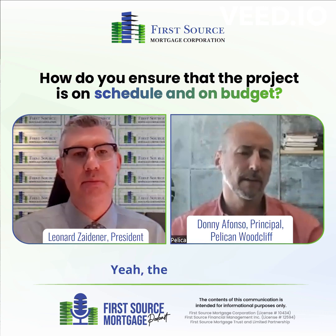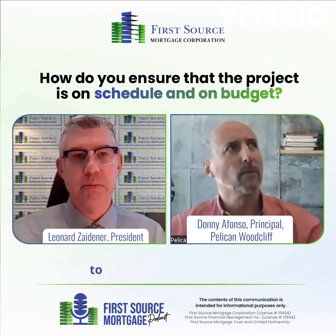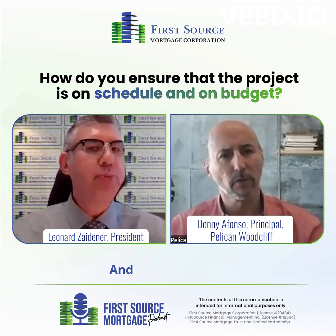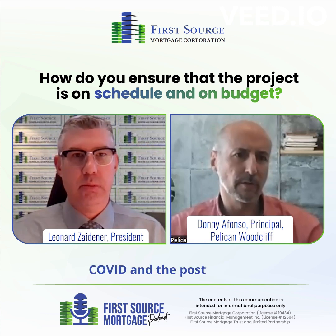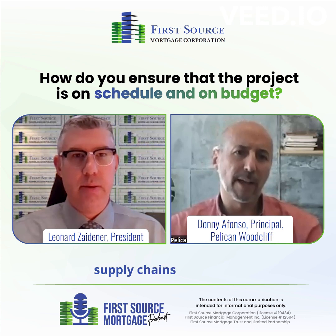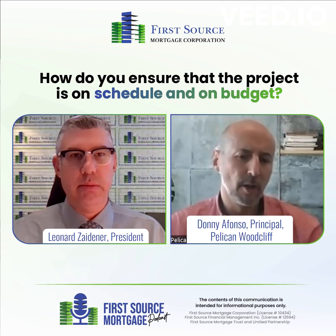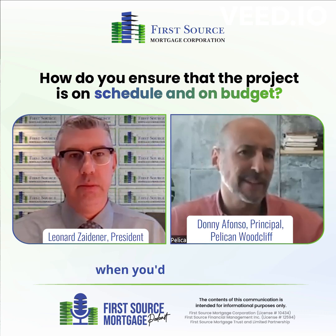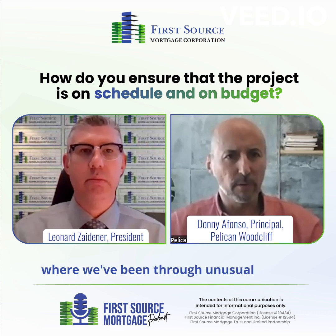Yeah, the timing of draws is typically once a month. And when it comes to the upfront report, one of the big items in there is the schedule review, and is the schedule going to be adequate? What we found during COVID and the post-COVID period is that a lot of supply chains had issues, and a lot of the developers had difficulty in getting things when they were meant to be there. I remember one project where they were waiting 3 months for delivery of doors, which typically you'd get the next week when you'd order them. So it really is one of those things where we've been through unusual times.